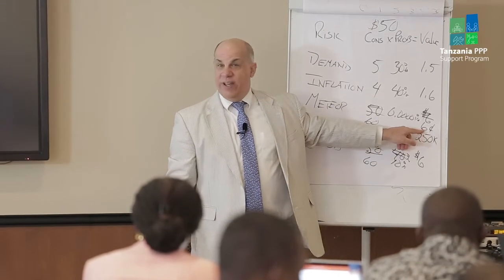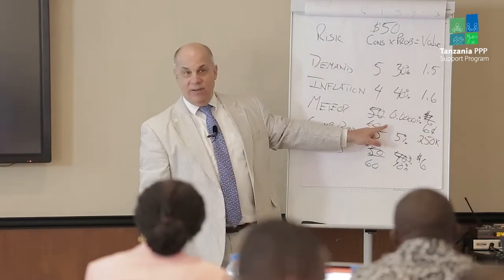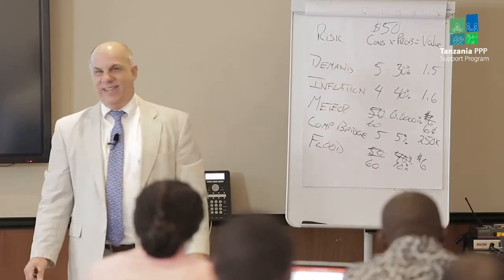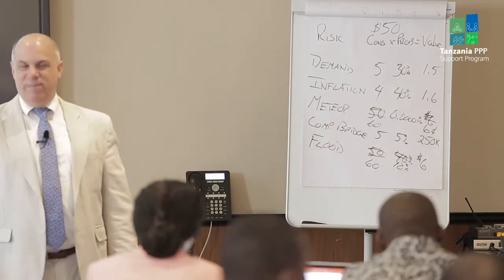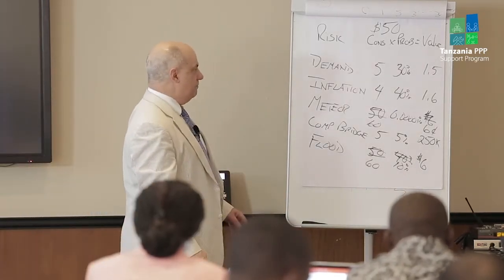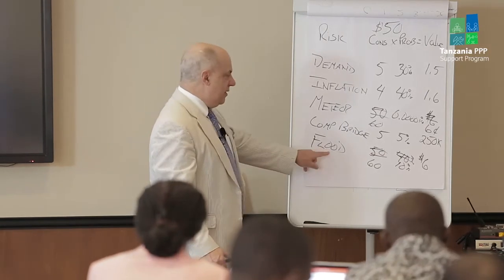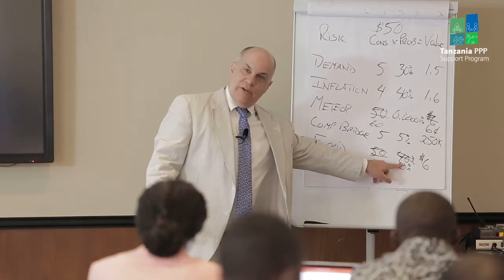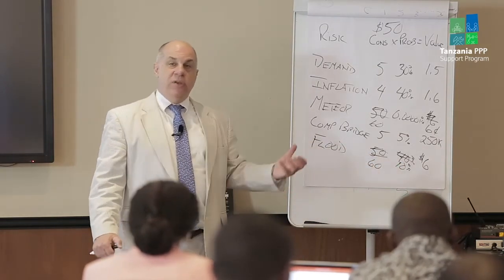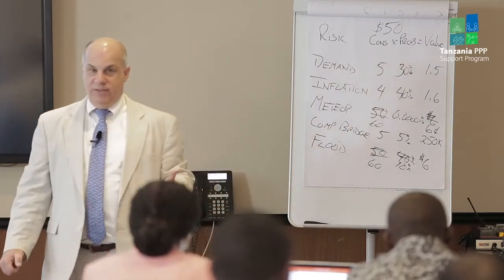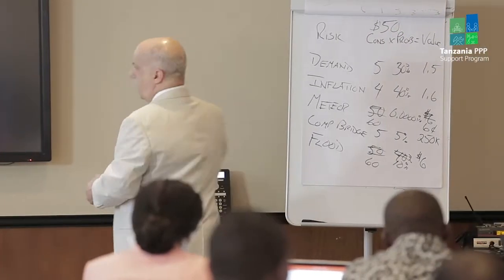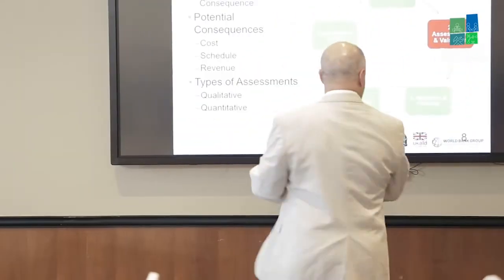The value of that risk, the consequence is 60 million. The value of that risk is only 6 cents. It's meaningless. Okay? On the other hand, if the government builds a competing bridge that's free, the value of that risk is $6 million. Big difference. Okay?